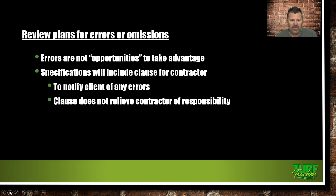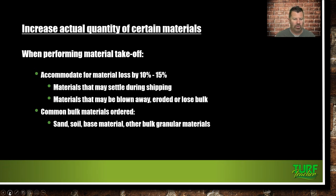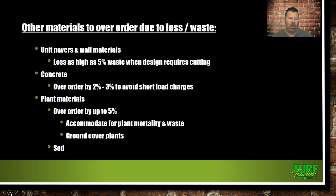Review plans for errors and omissions — errors are not opportunities to take advantage of. Specifications will include a clause requiring the contractor to notify the client of any errors. As a licensed landscape contractor, you're held accountable by the state with your bond. When performing a material takeoff, accommodate for material loss of 10-15%. Materials may settle during shipping or be blown away if loose. Common bulk materials to over-order: sand, soil, base material, granular products. For unit pavers and wall materials that can break, over-order as well. For concrete, add 2-3% to avoid a short load. For plant materials, over-order up to 5% to accommodate mortality.